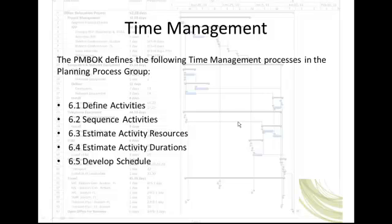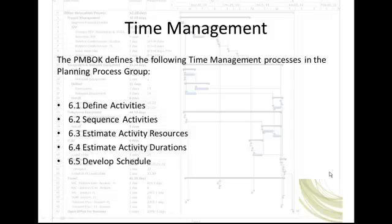Hello class. Today we will be discussing time management. A common approach project managers take when scheduling project activities is what I refer to as a calendar approach. The project managers begin the calendar approach by assigning dates to activities. When this approach may work, the number of projects that run into scheduling problems would indicate otherwise.